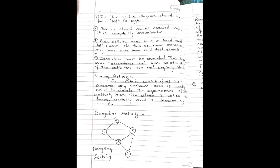Next concept: Dummy activity. An activity which does not consume any resource and is only useful to denote the dependence of an activity over the other is called as dummy activity. It is denoted by dotted arrow. This is the network diagram: 1 to 2, 2 to 5, 1 to 3, 3 to 4, and 3 to 5. So 3 to 4, if you keep it like this only, this becomes dangling activity. So 4 to 5, we have to draw a dummy arrow, dummy activity, so that this will not be a dangling activity.